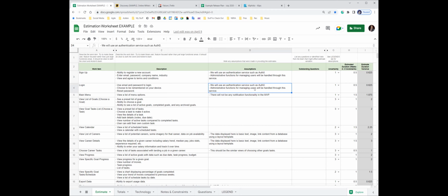And if I use something that is kind of a bootstrapper like that, then a lot of those things I don't have to do. If we have any questions during an estimation session, I put them in here, and then I go revisit the client and try to answer those questions. If we need to move on to estimate it, if there's an outstanding question, I'll answer it with an assumption and put it in here. But then I'll come back and validate those.